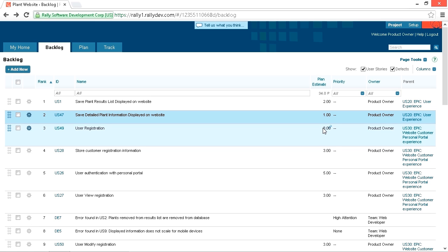Also, the rule that every team member needs to agree on the estimate almost guarantees discussions that will bring out uncovered assumptions and missing requirements. If the QA team member thinks the story is large, while the GUI team member thinks it's small, there's obviously something one knows or assumes the other is not aware of. More discussion is needed to fully understand the user story. This discussion around estimates brings the entire team to a shared understanding of what is required to complete the user story.